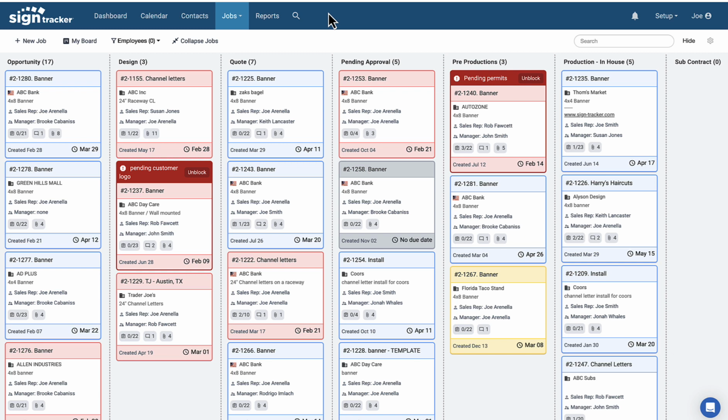I also think you should be having production meetings in your shop. I know some shops, they're on it. Every morning they have a production meeting, and I think that's awesome. For our shop, we would have a big production meeting on Monday after lunch. We would go through each and every job card and talk about where things were at. Some we would skip, obviously, if everything was on track and we knew it. But for the most part, we would try to touch every single job.